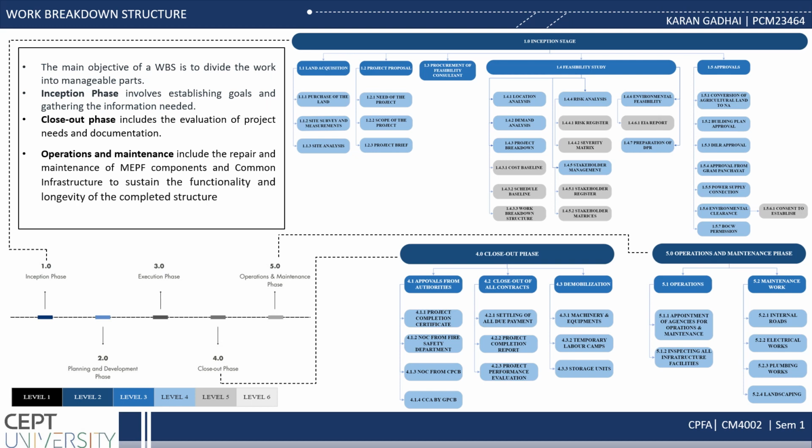Then comes the closeout phase. Making a project ready to give over to the client is the project closeout phase. Providing a successful handover also entitles clearing away construction leftovers, organizing the project's documents for transfer, and guiding the owner through building operations and maintenance. Before the owner takes over, any adjustments that need to be made must be made at this time as well. The project manager, the general manager, and any necessary subcontractor must work together to complete this.